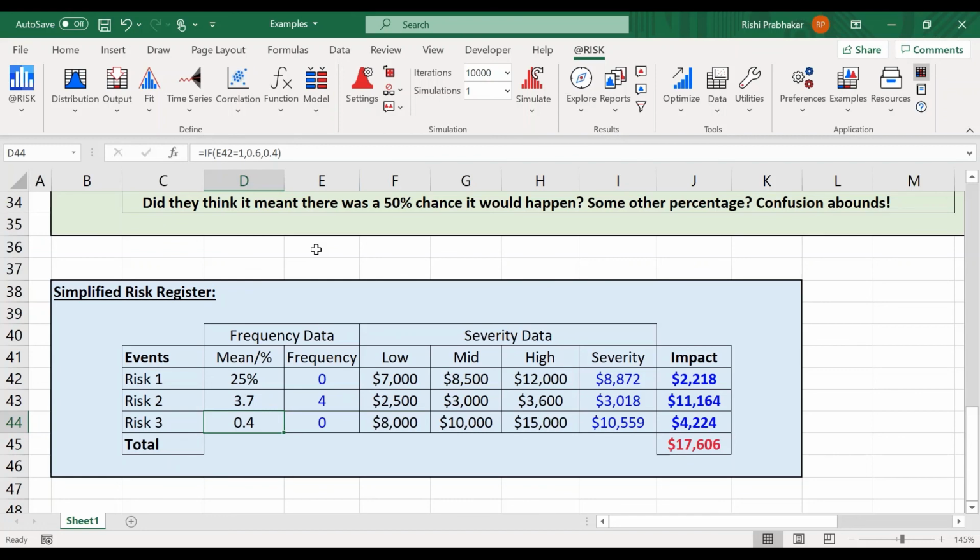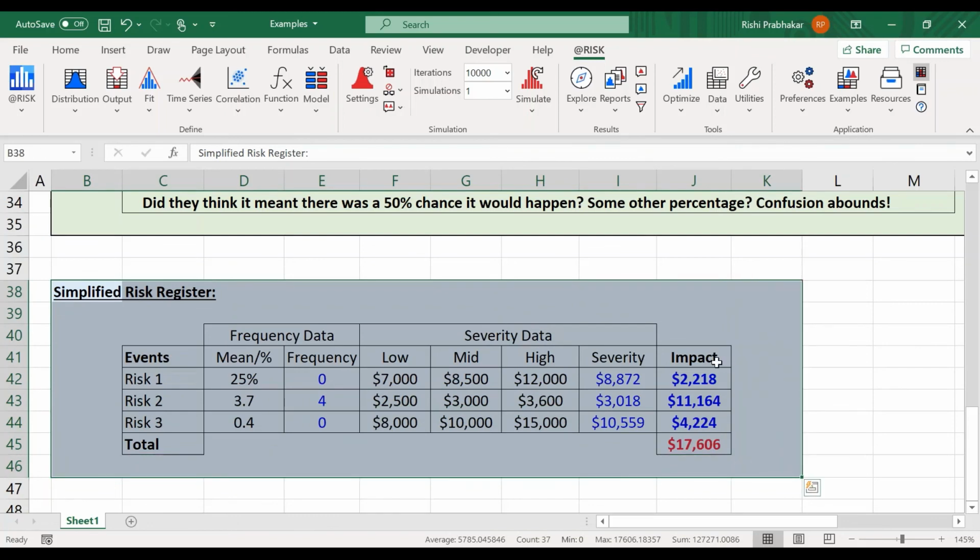Great. So the chronology of the model essentially determines what it is you need to put into it. A compound simply says, here is the frequency for whatever time period this cell is relevant for, and here is the severity for that time as appropriate to that time period. So if this was my whole risk register, then it's basically life of project modeling.